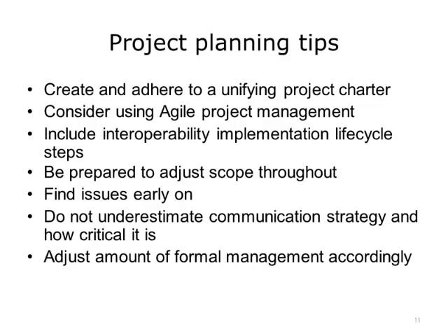Due to the diversity of stakeholders, a consistent and comprehensive communication plan is critical. Smaller projects will not need as much formal management. So adjust the amount of formal management accordingly, because the amount depends on the size and complexity of the project. These tips will help with any kind of project, but especially one for implementation of health interoperability.